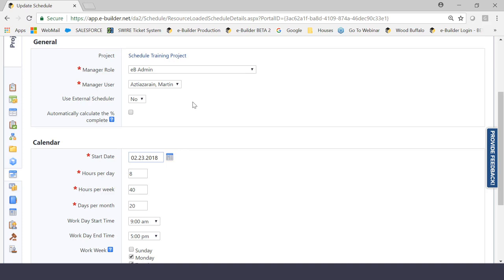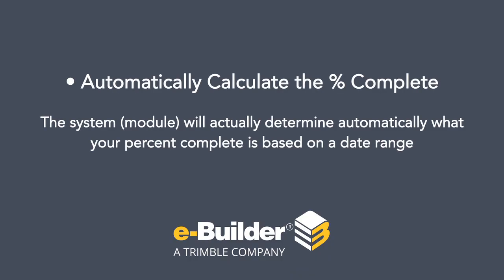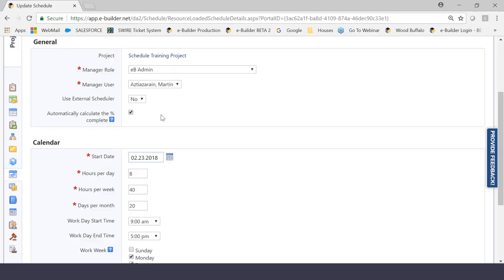Finally, the last setting in the general section reading automatically calculate the percent complete. It's simply a checkbox. And if you were to check this box like so, what you're in essence saying is that the system, the module will actually determine automatically what your percent complete is based on a date range. So typically when I train this, I give very simple dates, that way you guys can understand what I'm talking about here.